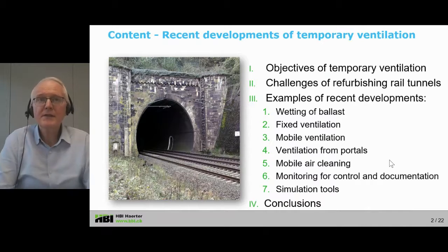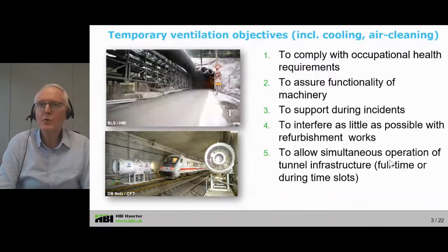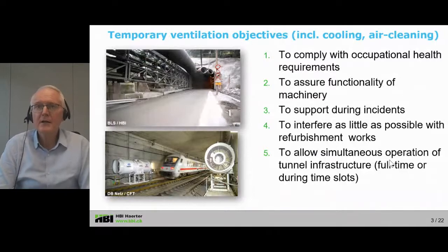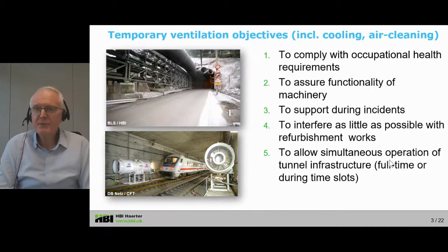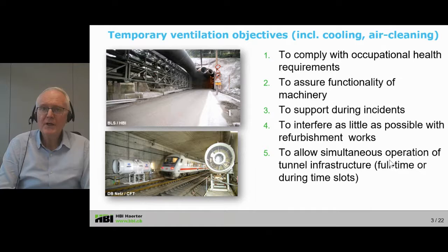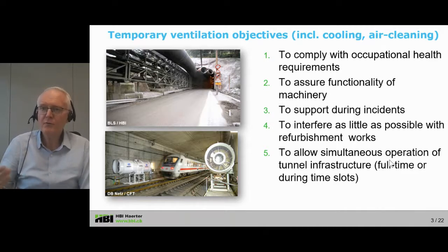I will start with these objectives of temporary ventilation in a wider sense, so including cooling or air cleaning. The objectives are to comply mainly with occupational health requirements. Then, of course, we want to assure functionality of machinery, support during incidents, and then that's the key requirement or key complication: we do not want to interfere as little as possible with the actual refurbishment works. And then we want to allow simultaneous operation of infrastructure, either full-time or during time slots.